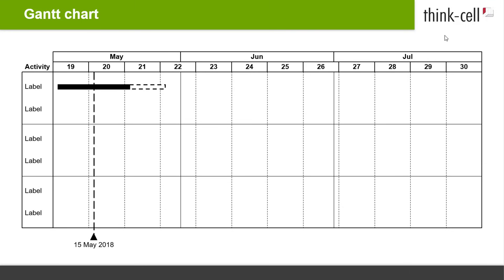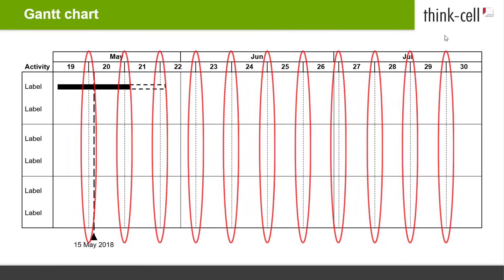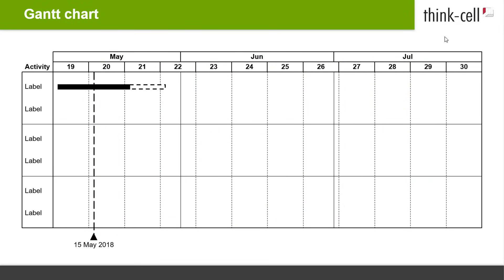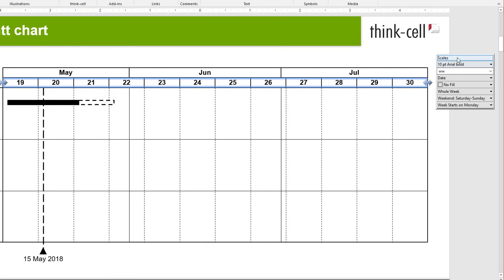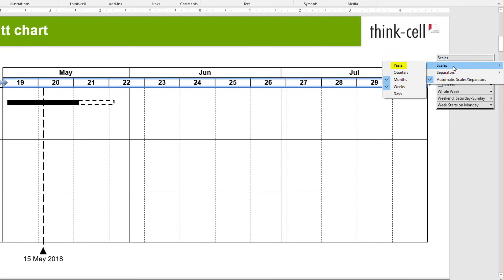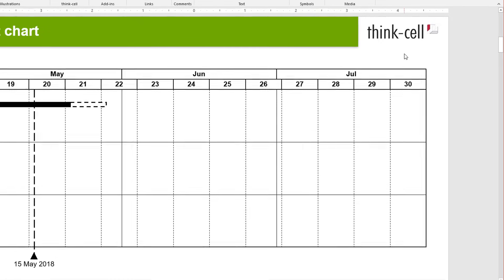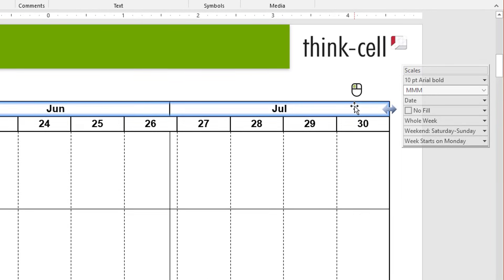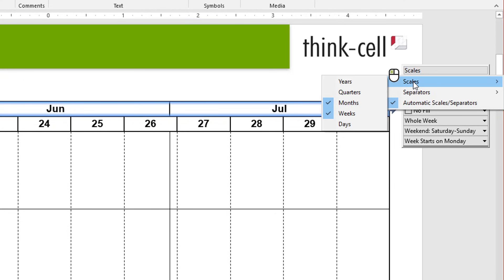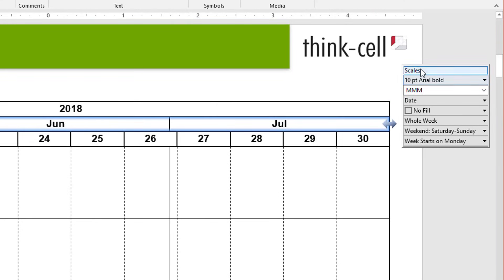ThinkCell automatically displays appropriate scales and separators for your individual Gantt — in this case, months and calendar weeks. There are also scales and separators available for years, quarters, and days. If you would like to display different scales and separators than those automatically picked, left-click into the top right corner of the chart and tick or untick your preferred option from the floating toolbar.